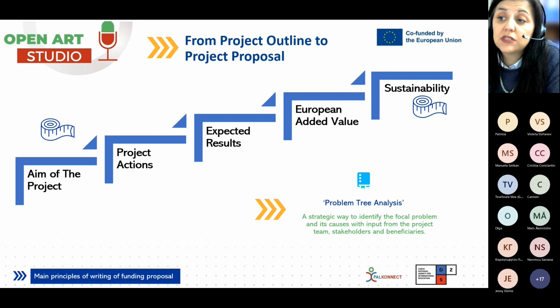The project proposal itself should only be written after the publication of a call for proposals, as we said before, and the thorough reading of the conditions for participation and thematic focus of the call. Be very careful on that. The drafting of the proposal is a time-consuming exercise and a task that can keep a single person busy for a week. You should therefore either start your proposal early or consider dividing the work between a team of people.